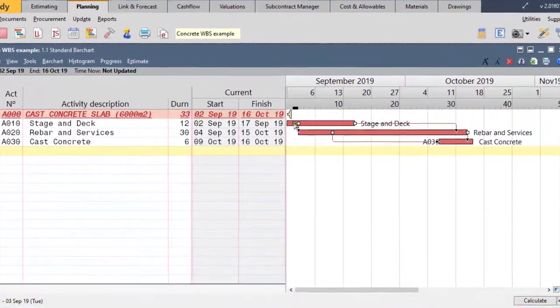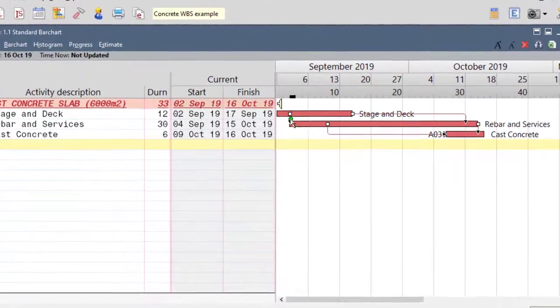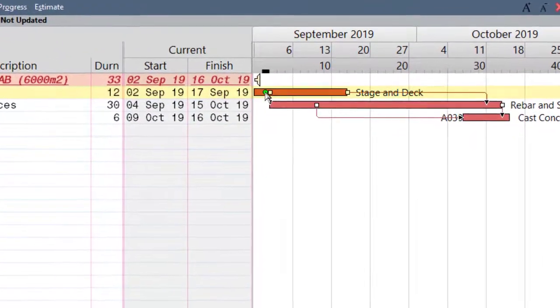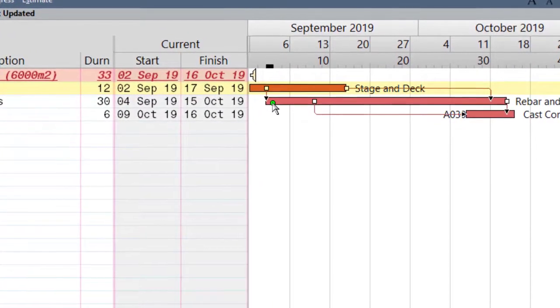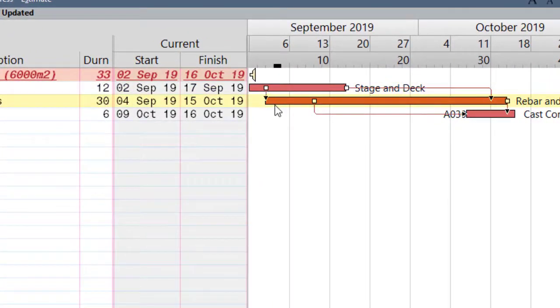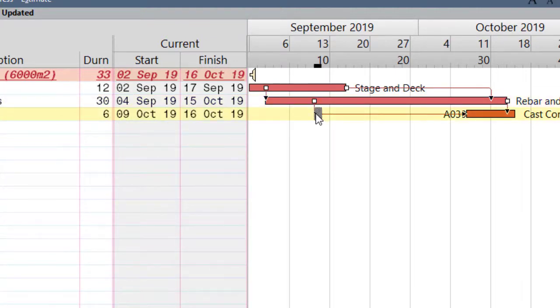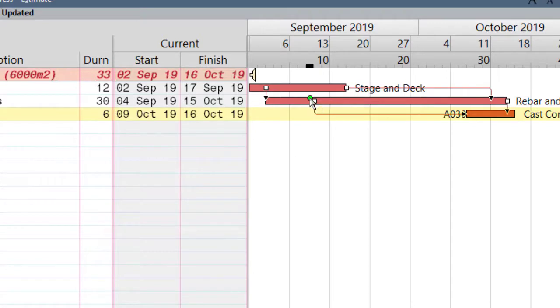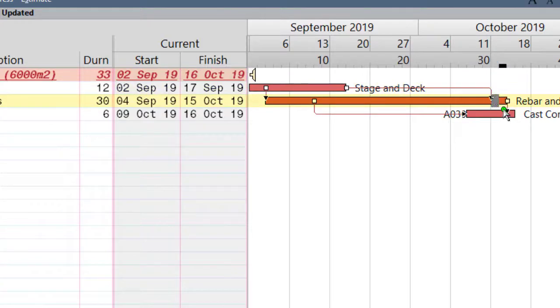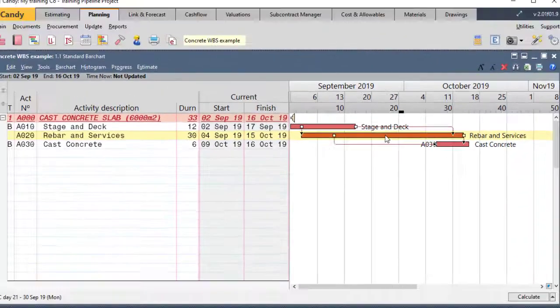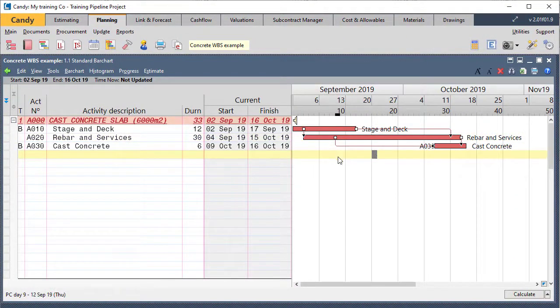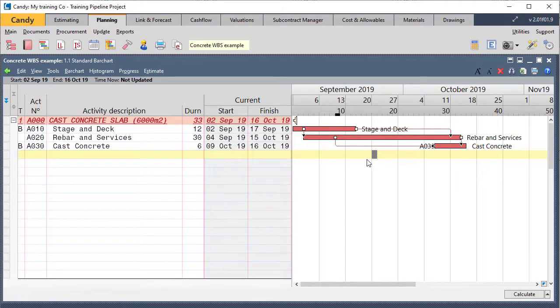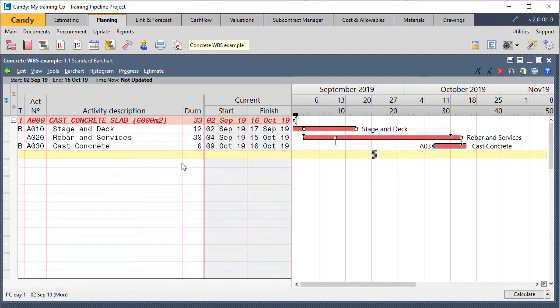Looking at these productions, my links basically means that after staging and decking, after two days of staging and decking, we can start with the rebar and services. Then after about five days of rebar and services, we can start pouring the concrete. Although because it's only six days, but due to that finish to finish link with my concrete, it just moves it out there. And staging and decking once it's complete, we need at least two days thereafter for the rebar and services. So looking at my logic, it's 100% complete, let's assume or intact for this exercise. Let's also assume my durations and productions are 100% accurate for my particular site. So there's nothing wrong with this sequence of activities, except if you look at the level of detail, we have to ask the question, is this sufficient to control and monitor our project?